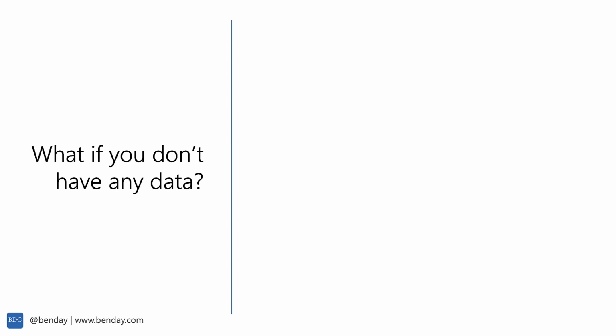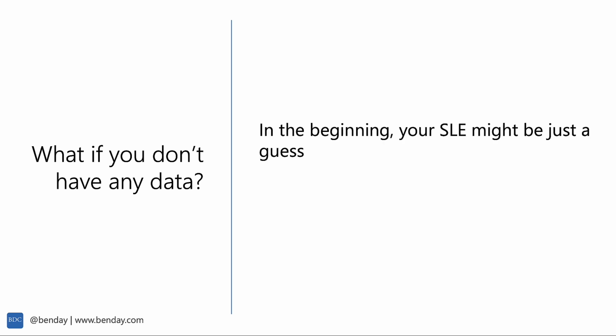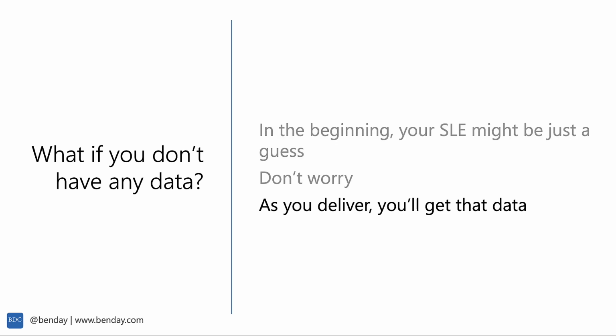Now, some of you out there are thinking, hey, I've got a new team. I don't have any data. What do I do? In the beginning, your SLE might just be a guess. And it might not be particularly meaningful because it's just a guess and it's not based on any data, but don't worry about it. Because as you deliver, you're going to get that data. And you're going to get that data pretty quickly, especially if you focus on minimizing your work in progress and shipping things and driving things to done as fast as possible.